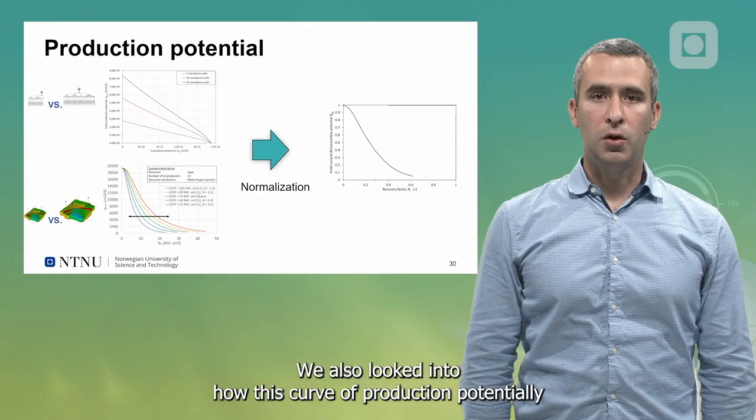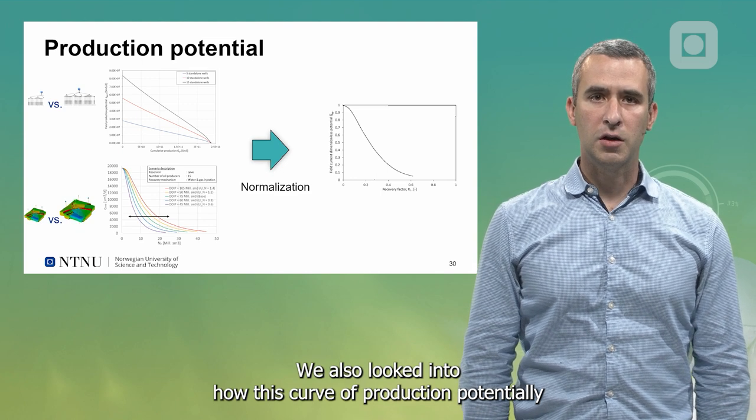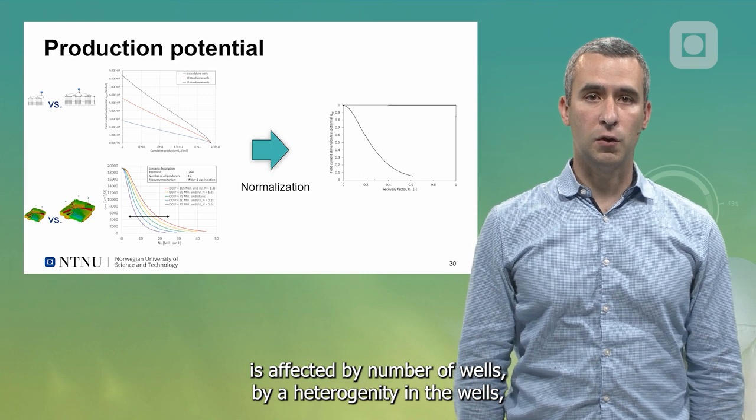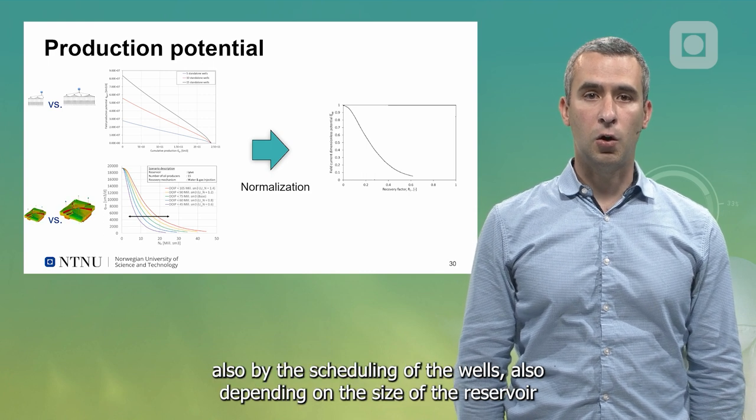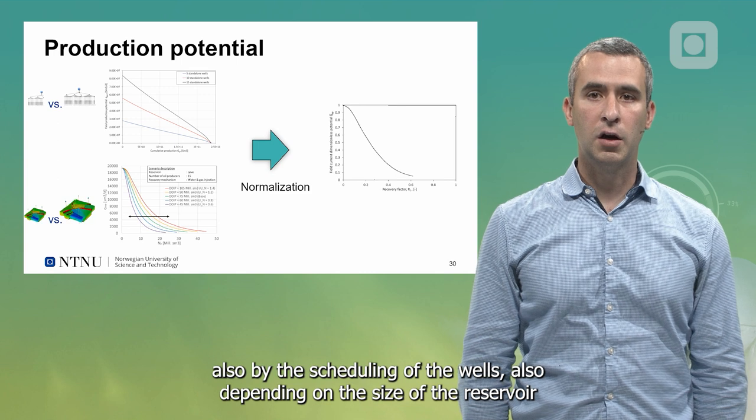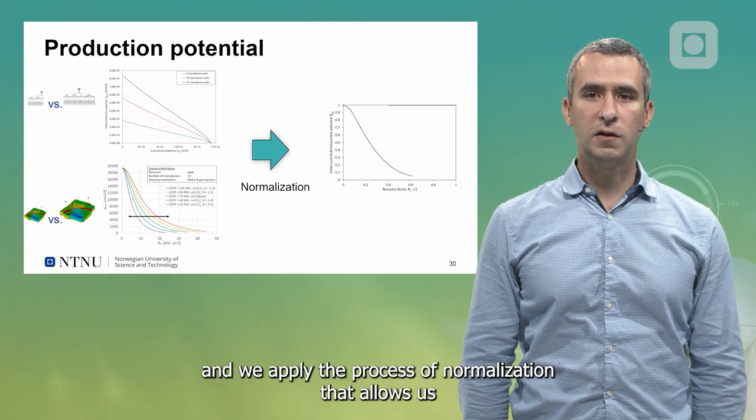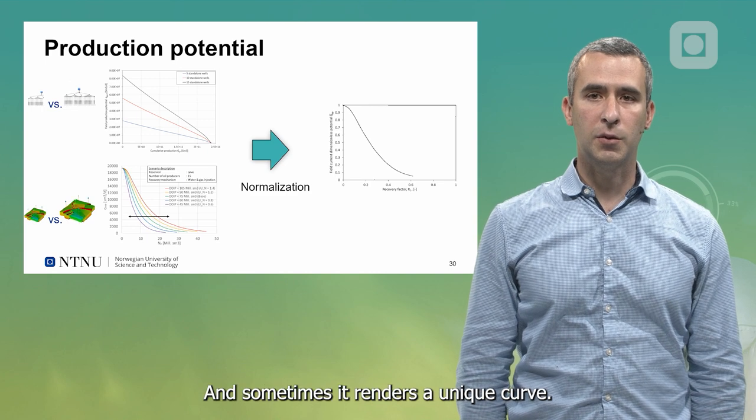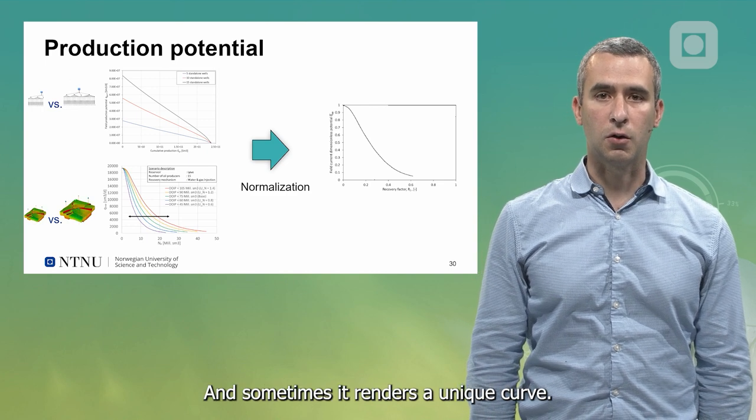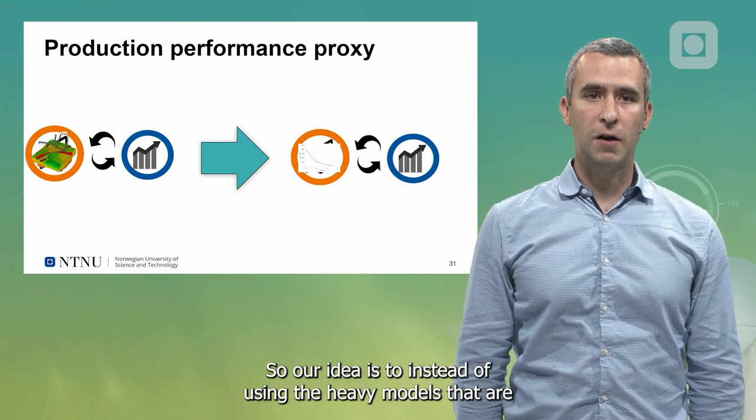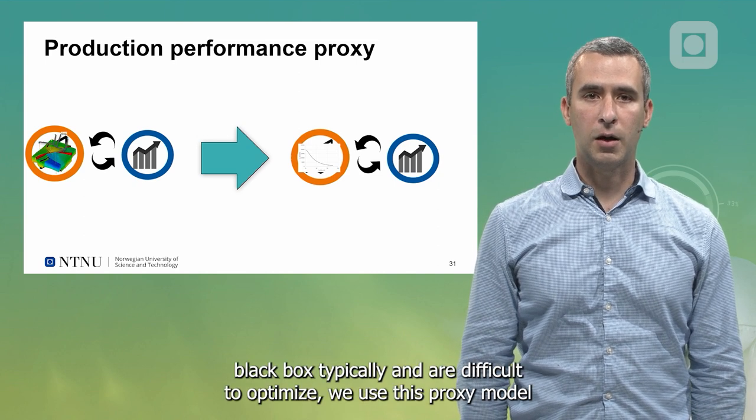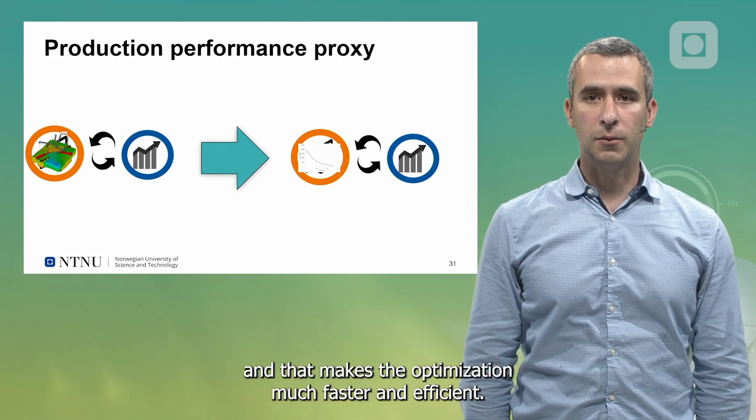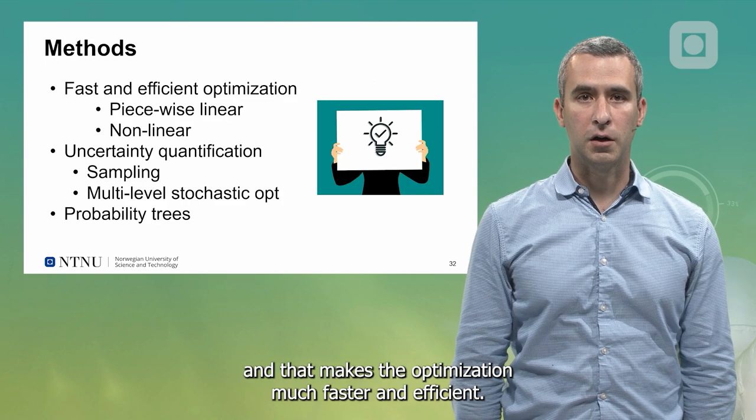Then we use that proxy model to generate production profiles without using the original heavy model. We also looked into how this curve of production potential is affected by number of wells, by heterogeneity in the wells, by the scheduling of the wells, and by the size of the reservoir. We applied a process of normalization that allows us to capture all of these effects and sometimes it renders a unique curve. So instead of using the heavy models that are black box typically and difficult to optimize, we use this proxy model which makes the optimization much faster and efficient.